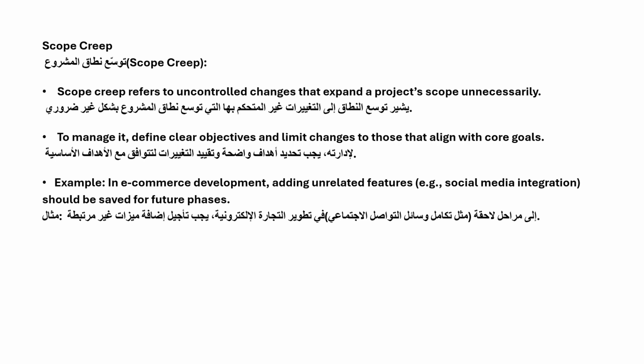If you are using the change control process, you remember in the previous slides, there is a process where the user had to fill a form, and then after filling the form, we have a committee that is going to review the form, assess the impacts, and then decide either to accept or reject those requirements. So using a change control process will help stop scope creep. That's very important here. There is also an example here that you can read.